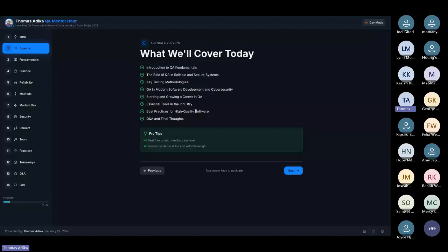If there are 9, that's not okay. If the client also wanted a rooftop and we didn't put a rooftop, then I have to document that. At the end of the day, I come to my team and tell them this is what you've done, and this is what you haven't done. Then I make sure they fix them. After they fix them, we get the 1 million because that's what the contract says.